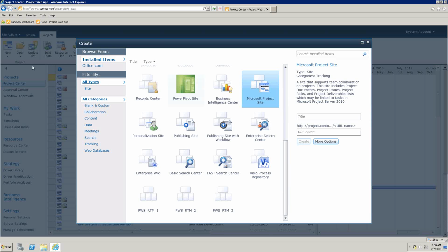What I mean by that is, in the Project Center, you may be accustomed to seeing issue, risk, and document icons next to project schedules. That's the special functionality that you get with the project site, as well as the ability to create issues or risks and assign them to people and have those assignments show up on that person's home page in Project Web App. So if you want to create a Microsoft Project Server project site, you want to start from this template.